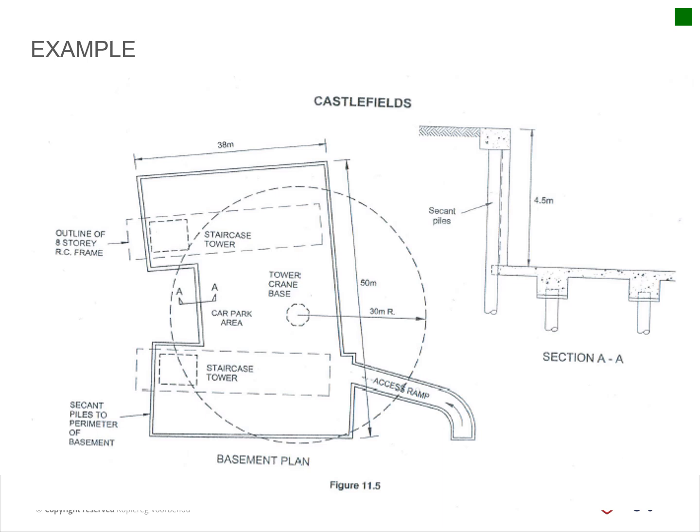The excavation works in association with removal of spoil to reduce the ground to the required level, allowing construction work to basement piling and floor to commence. Construction work includes pile caps and bases within the basement area. The basement excavation is to take place between the secant pile wall. Access to the 5-meter deep basement is via proposed access road. So here's the access road that they've got planned.